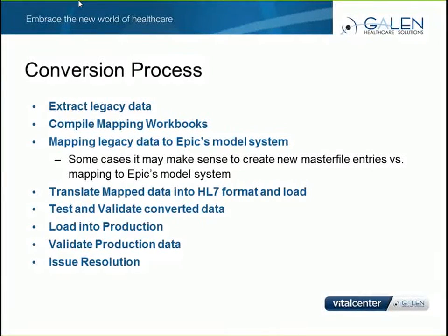After the analysts have mapped the data in the spreadsheets, you will get this information validated by the end users. Once the sign-off is complete, the tech team will take this data and format it into HL7 messages. These HL7 messages are then loaded into a test system. After the data is loaded, this is when your testing and validation process starts.